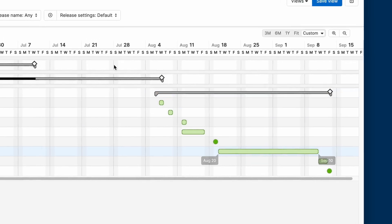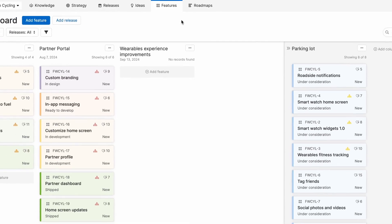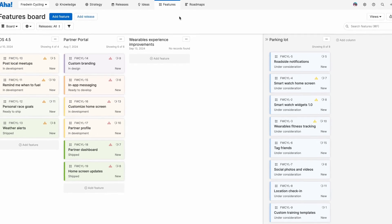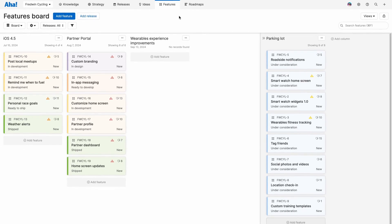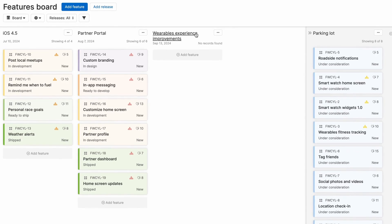Now let's head over to the features board to manage the details of what you want to build. Here you can organize your product backlog and prioritize features into upcoming releases. In our example, we already have defined a few releases and you can also see the new release we created a moment ago. Let's go ahead and add some features to it.